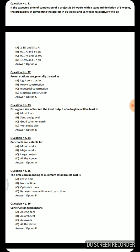Next question: If the expected time of completion of a project is 60 weeks with a standard deviation of 5 weeks, the probability of completing the project in 50 weeks and 65 weeks respectively — applying the formula, the answers are 2.3% and 84.1%.